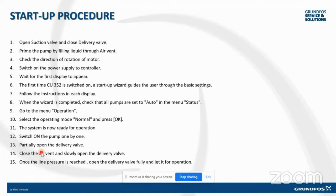And that is where you must have seen, I had said that the delivery valve is important, because when you are commissioning the system at that point of time, it helps us because every time you cannot go out of the plant room and manage the flow. It is better to have a delivery valve to ensure that you can manage the flow and commission the system in a much faster way as compared to when you do not have a control in the plant room.